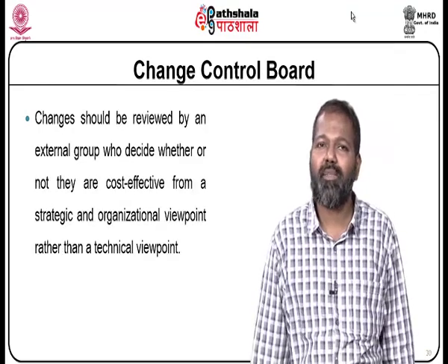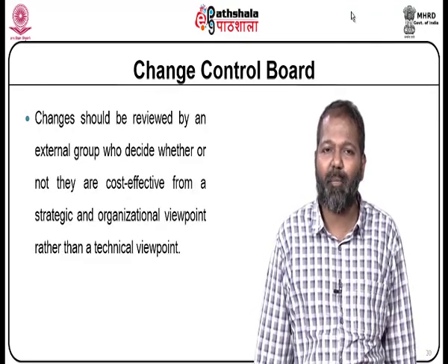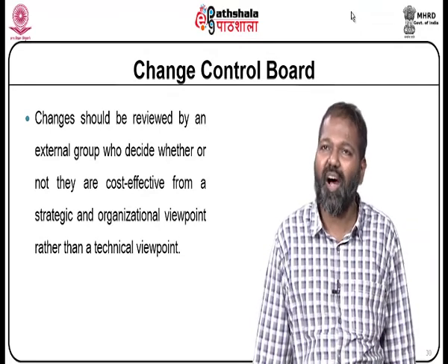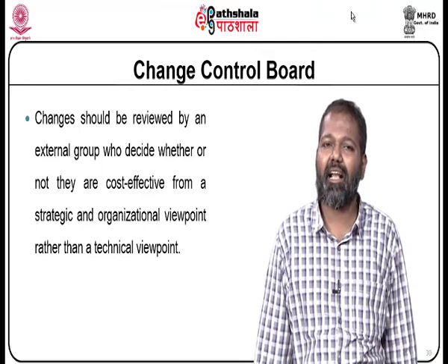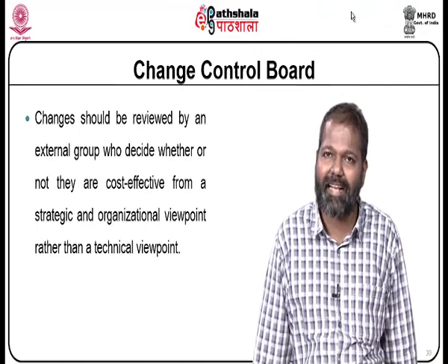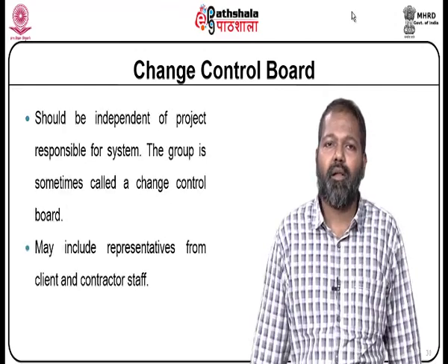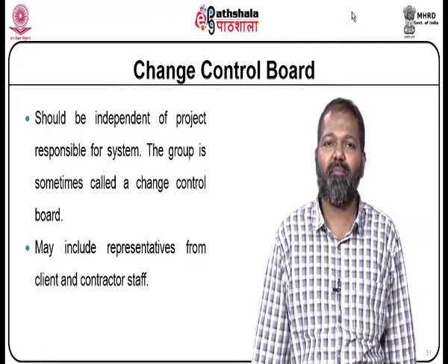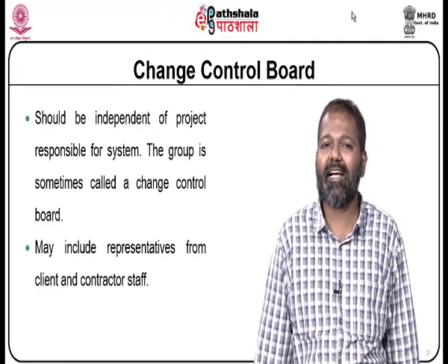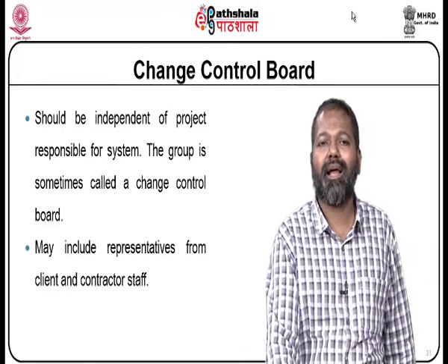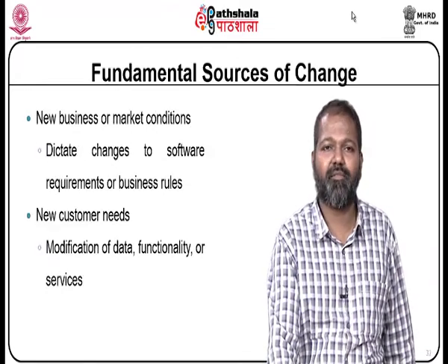Change control board: changes should be reviewed by an external group who decide whether or not they are cost effective from a strategic and organizational viewpoint rather than a technical viewpoint. Should be independent of the project responsible for the system. The group is sometimes called a change control board. It includes representatives from client and contractor staff.